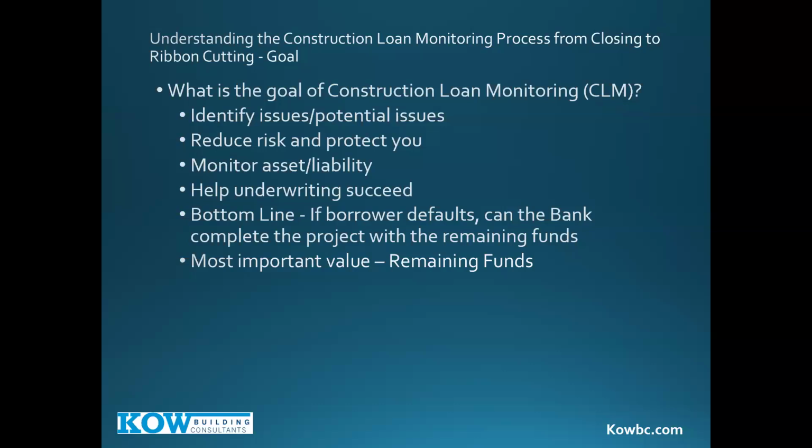You might think that the most important value in our funding report is the funding number. No, that's the second most important number. The most important number is the remaining funds. We have to look at it as worst case scenario. If we brought in a new contractor tomorrow, could they finish the project for the remaining funds?